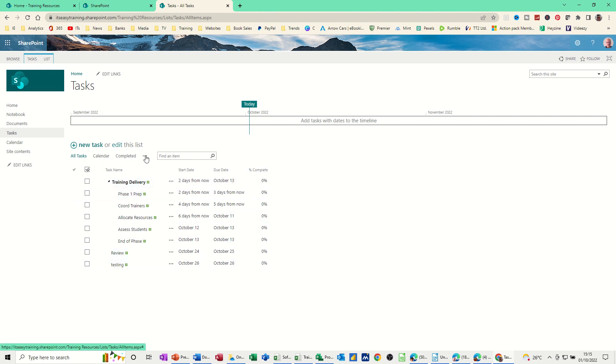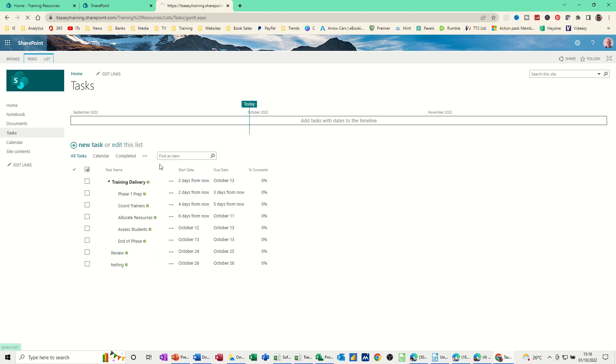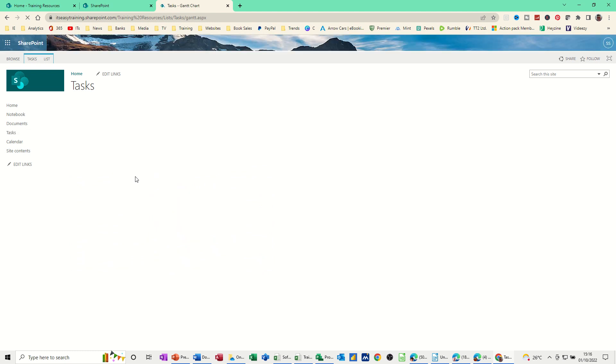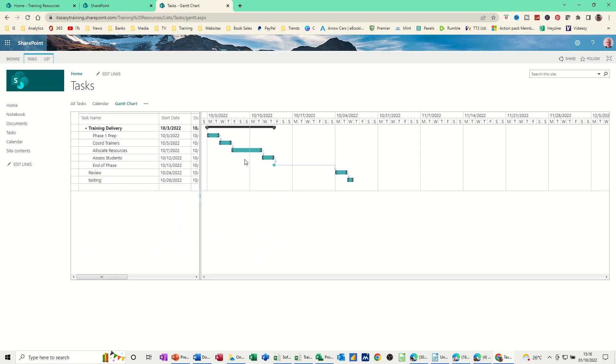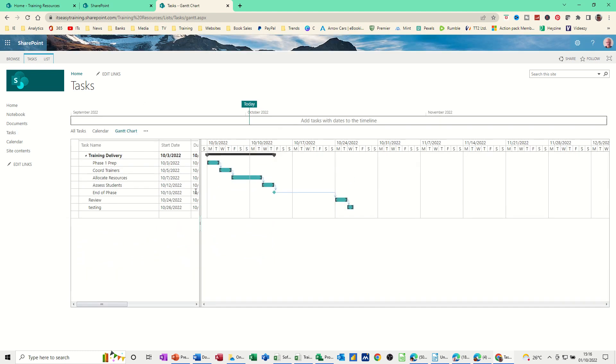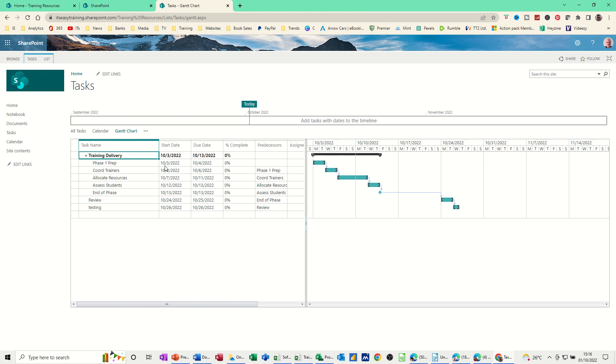You can also, from these three ellipses, look at this data like you can in Project as a Gantt chart. And then it will just create the Gantt chart for you, which looks very similar to Project. You've got all the information there.